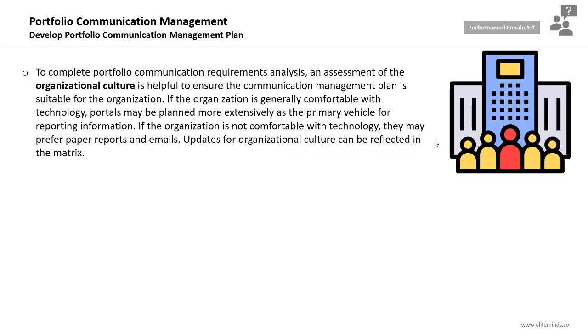To complete portfolio communication requirements analysis, an assessment should be done for the organizational culture to make sure the communication management plan is suitable for the organization, and let's see how the culture of the organization might affect this plan. If you are working in an organization where the resources are comfortable with technology, we can rely on dashboards, portals, and high-tech tools for communication. While if your organization's resources are not comfortable with technology, we might use paper reports and emails.